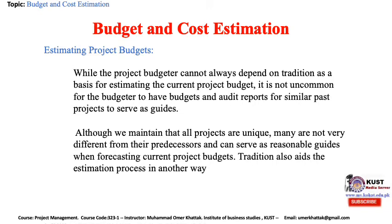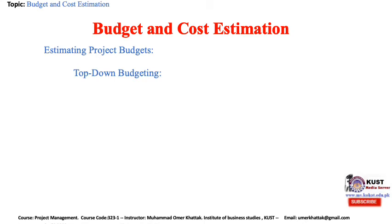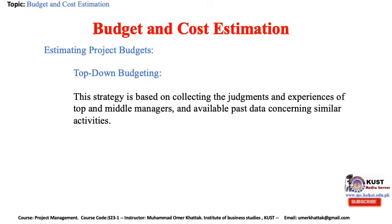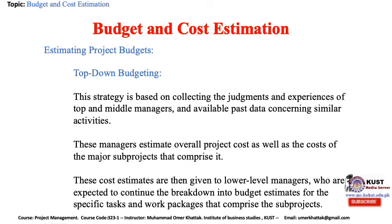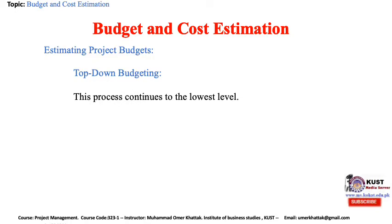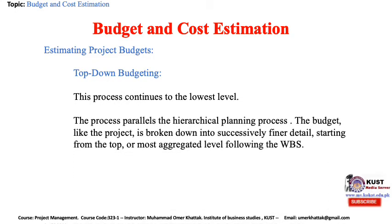There are two fundamentally different strategies for data gathering: top-down and bottom-up budgeting. Top-down budgeting is based on collecting the judgment and experience of top and middle managers, along with available past data concerning similar activities. These managers estimate overall project cost as well as the cost of major sub-projects. These cost estimates are then given to lower-level managers, who continue the breakdown into budget estimates for specific tasks and work packages. The process continues to the lowest level, paralleling the hierarchical planning process — the budget is broken down into successively finer details following the WBS.